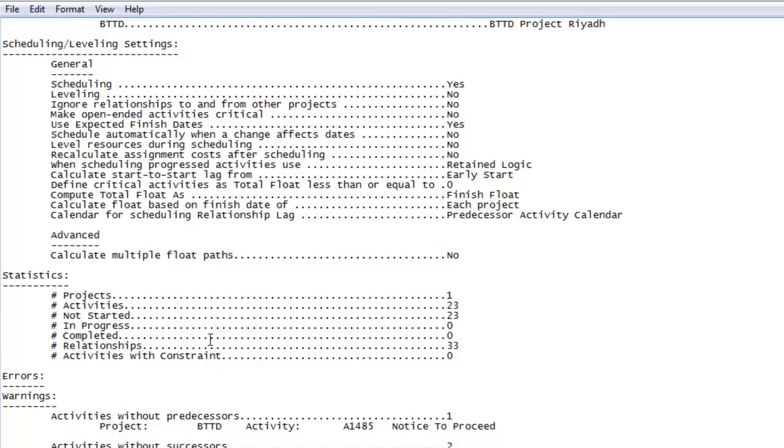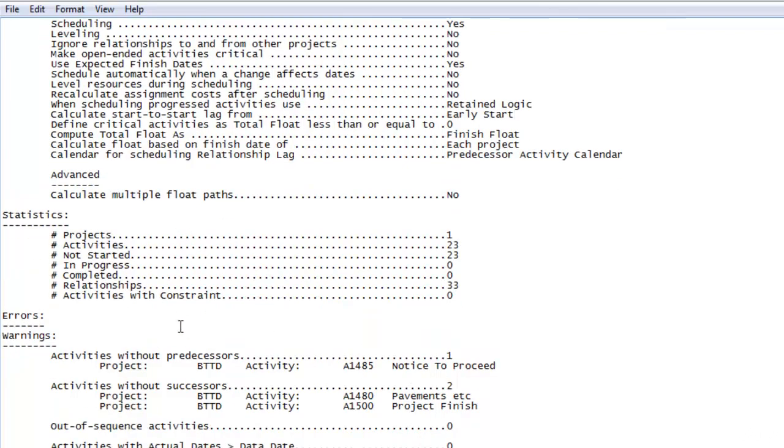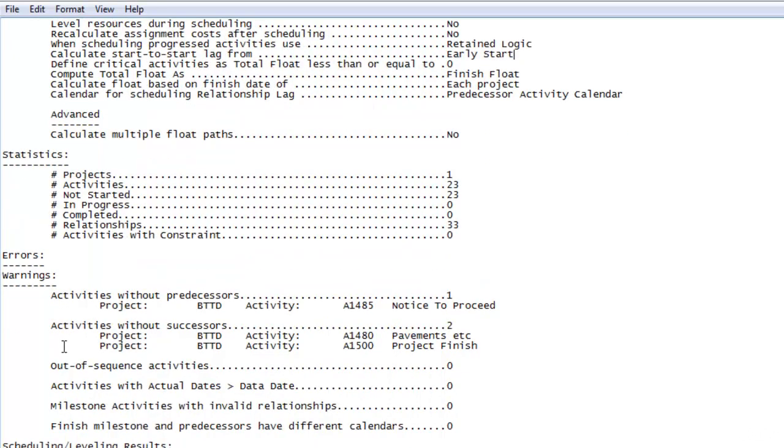In addition to this, it gives us errors and warnings. If there are any errors or warnings, that will be present here in the log as well. It will also tell us how many activities are without predecessors, how many activities are without successors. It gives us detailed information about that, along with the activity name and activity ID.